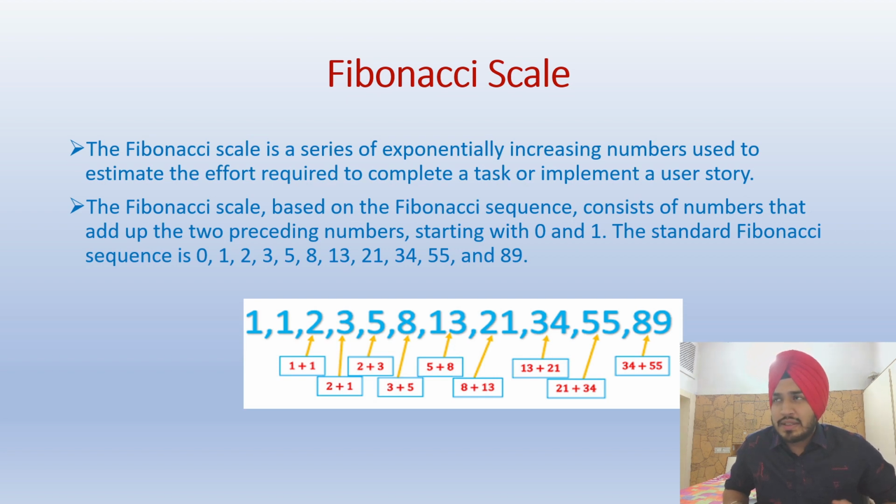If they think that this user story will take more days than that, they will break down the user story, and similarly tasks would be assigned. But in some organizations, user stories may go up to 28 days, that is 1 month. So 13 points can be given in that case.